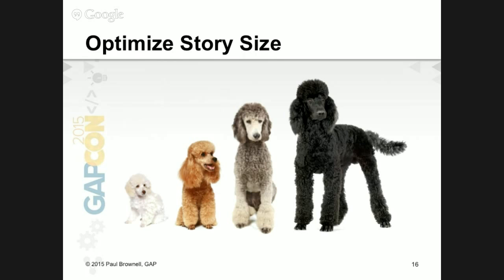So, if it's 3 days, it's fine. If it's half a day, it's good. But if it starts to really move far away from that, it starts to become more complicated, more overhead, and more risk involved. Any questions on story size? Scope?